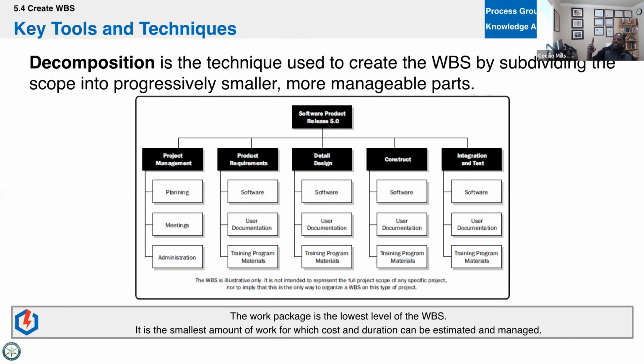That integrated change control will look at that and say, okay, which parts of our project need to be updated, and what's that going to do to the scope, schedule, budget, and risk. So there's an analysis piece that takes place, and then you make the request so that folks have all the information to make a decision. So the 100% rule is always in play with your projects.